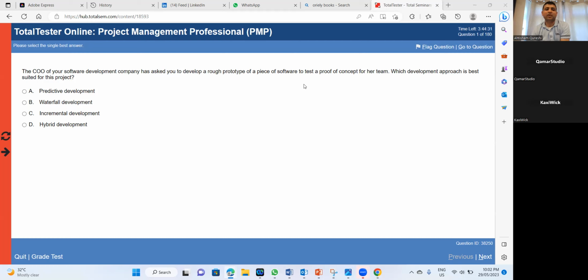Incremental. Okay, so in incremental what we do is add a feature, then add another feature on top of it, and then another feature on top of that. In this way we move on, right? Right. But in Agile, we add, let's say, 3 features, and then we enrich those 3 features in the next iteration, and enrich them further in the third iteration, and so on.